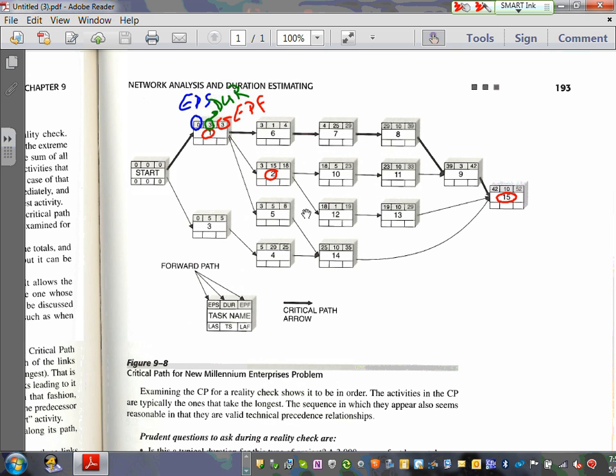So these are the activities. The duration, we'll talk about how you come up with the duration. That's what I wanted to do, and I know it's getting into the network analysis. Then these guys, the earliest possible finish time equals the earliest possible start plus the duration, which is DUR. So Derek, to give you an example of this, guys, so if you take the earliest